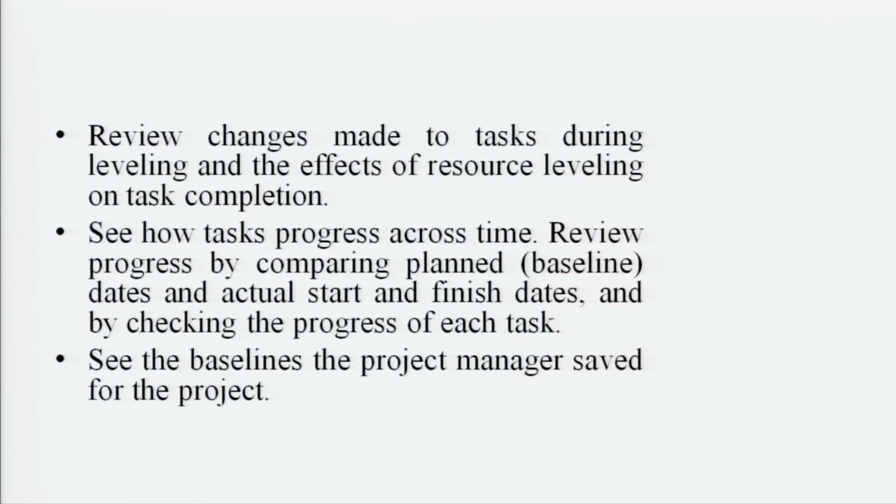Review changes made to tasks during leveling and the effects of resource leveling and task completion. See how tasks progress across time. Review progress by comparing the planned dates and actual start and finish dates, and check the progress. As I said, we have to review day by day, week by week, what we planned and what the execution is, because a difference between planning and execution always hampers things.